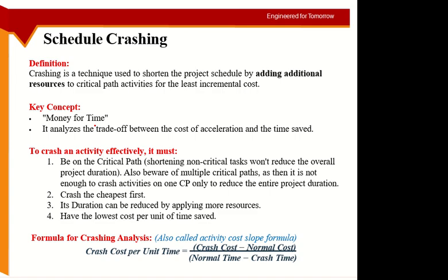And we also discussed that the float on this path should be 0 and so on. We also discussed drag, which will come into play here. I hope you remember those terms and their meanings. Because the duration of the project comes from the critical path, if you are compressing an activity which is not on the critical path, it will have no effect on the project duration.